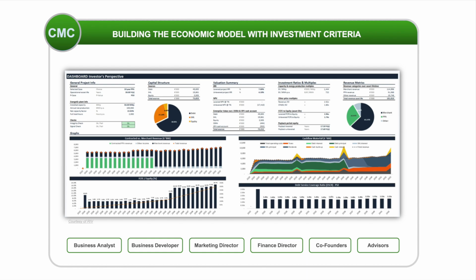The preparation, testing and running of the model requires various financial and business specialists in order to verify and ensure robustness of the model. To ensure that the CAPEX estimate input is at least a Class 2 estimate, -5% to +20%, supported with OEM, EPC, or EPCM tender pricing, the project development phases have to be completed in accordance with the technical front-end loading requirements. OPEX estimates have to be developed in line with operational philosophy and with the support of O&M specialists and cost estimators.